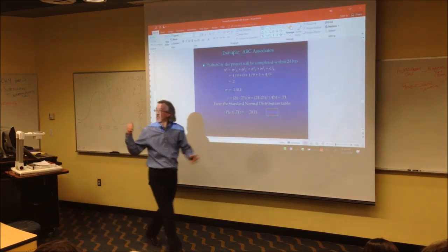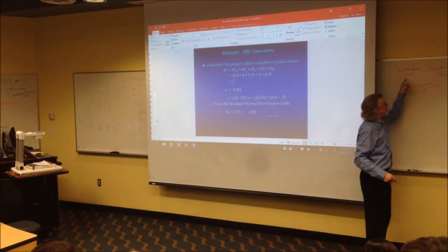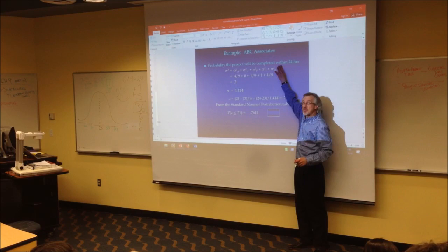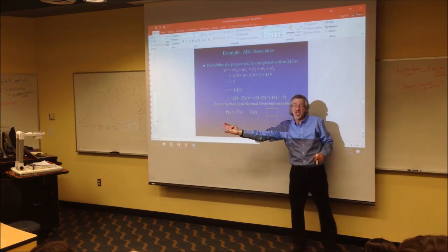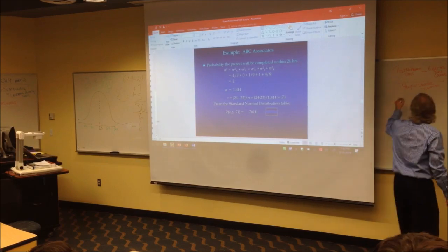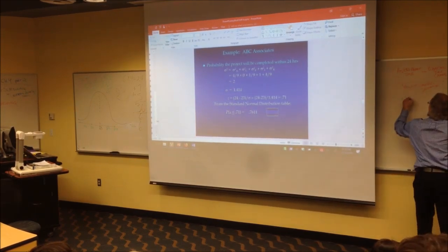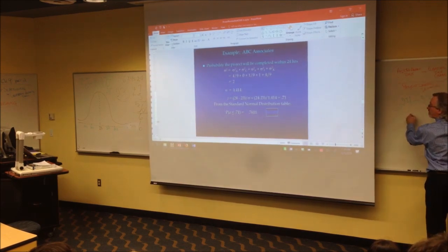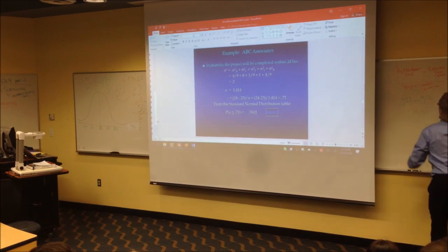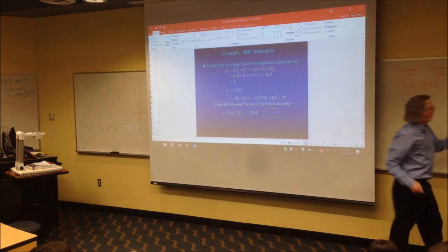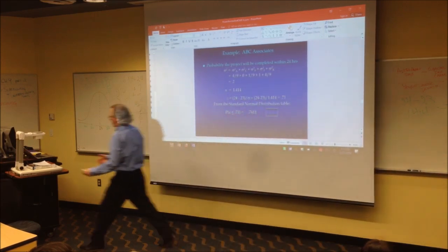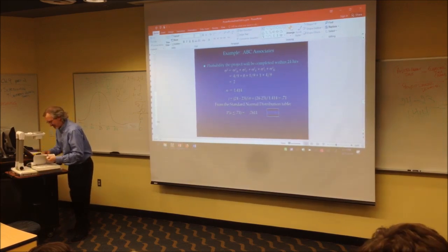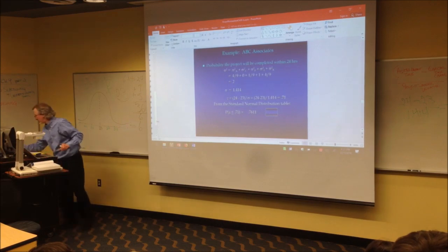You ready? Here we go. We're following this rule. This question says it's supposed to take 23 units of time. So what's the probability it will get done in 24 units of time or less? Follow this formula. What we're being asked about: 24 minus the expected time, 23, divided by 1.414, this project standard deviation. You end up getting 0.71. Anybody who has a book, go to Appendix A in the back. What? I don't hear any movement. Appendix A. And almost there. Here we go.